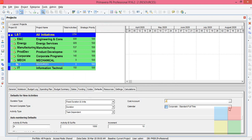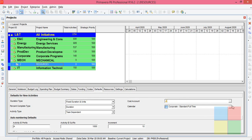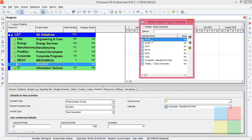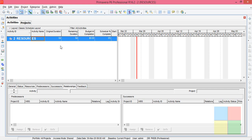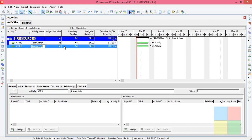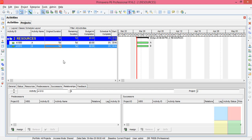Now let us assign a calendar for this project by going to Default Calendar, click the Browse button, and select 5 Day 8 Hour. Let us open the project. Now we are on the Activities window. I'll add two activities — one and two — and name them A and B, with a duration of five days each.